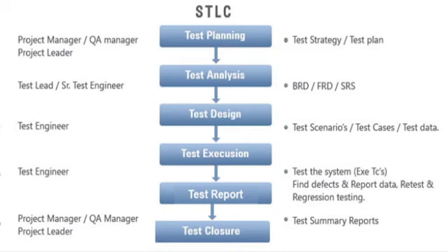which is final testing. Here, the team lead will identify the highest defect density module. On that module, testers are going to conduct retesting to find out the reasons why they got that many defects, so that they can take precautions for future projects. So this is all about test execution.